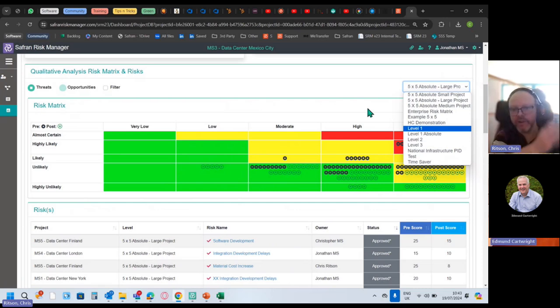So I tend to see those three columns, and then in probability terms, anything that's less than 1% is definitely in that lower column, then anything up to 50%, and anything above 50% probability of occurrence.